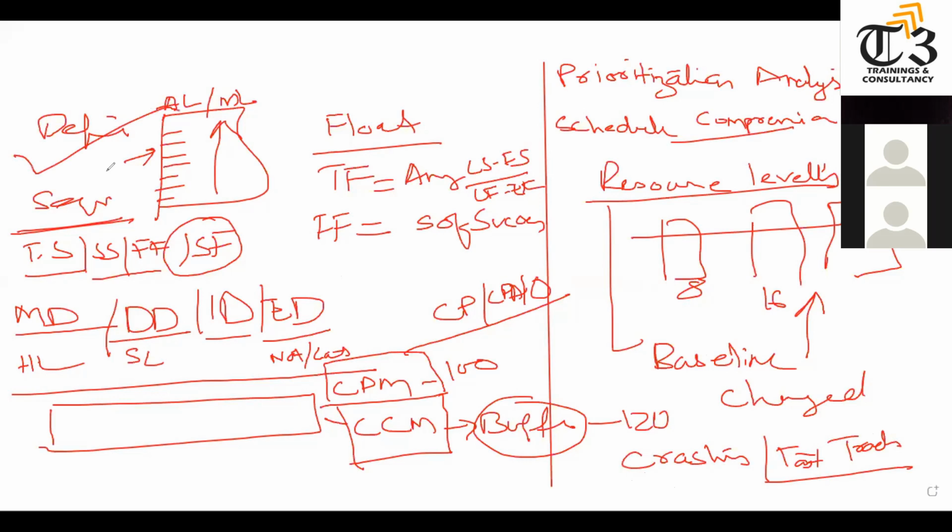So activities are defined, sequenced, and then we have the critical path or critical chain method done, and we have done the crashing and fast tracking. Once crashing and fast tracking are done, you will submit the schedule to the organization, so it will be approved. So it will become what? Schedule baseline, which will be added to the performance measurement baselines. So that's how we prepare the baseline in the predictive one.